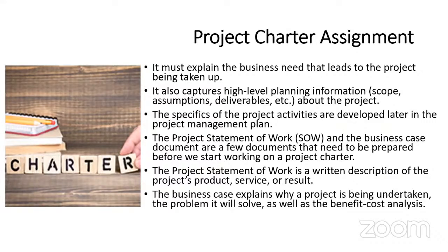The project statement of work and the business case documents are a few documents that need to be prepared before we start working on a project charter. So as part of the major inputs, you need the project statement of work and the business case before you can go ahead developing a charter. The project statement of work is a written description of the project's product, service, or result. The business case explains why a project is being undertaken, the problem it will solve, as well as the benefit cost analysis.